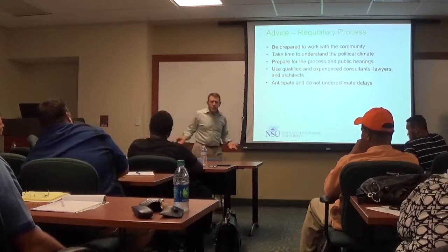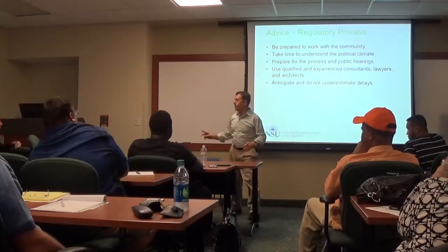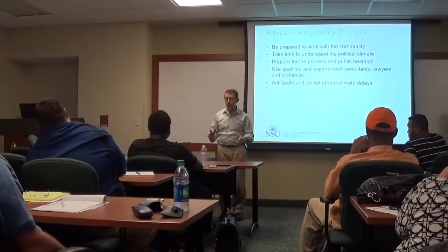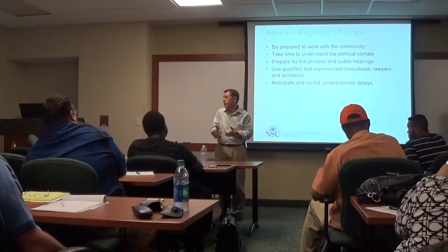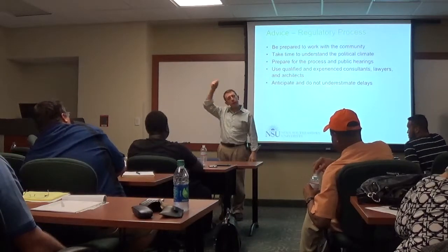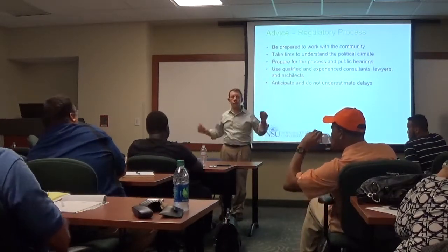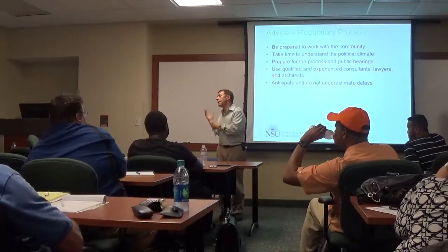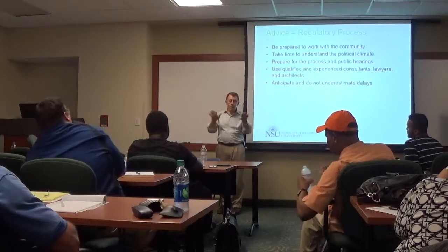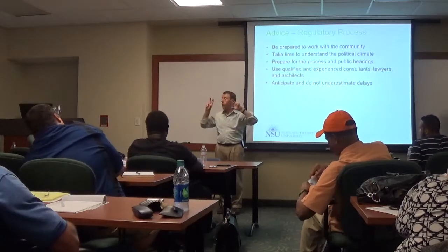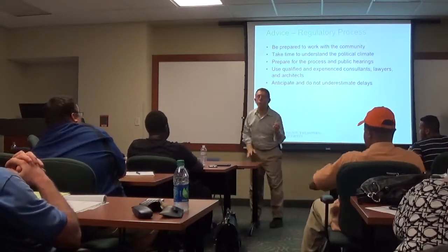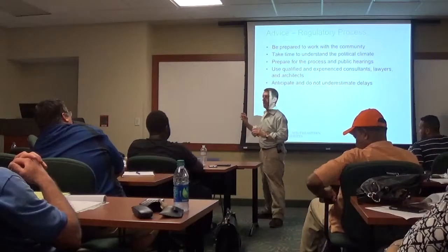Without the hearing, how does the public have a voice? Well, the public has a voice for a simple reason. They can file a paper and they can still. So if the zoning truly were as of right, the public doesn't have a voice, but if enough people get up and raise their flag or rabble-rouse, it has a perception on the elected official. But many of these communities have what they call planning commissions, zoning boards, and others that are part of the approval process. And what they went through at Style was an administrative review. They never hit the public.